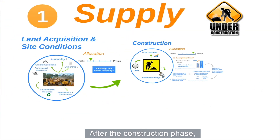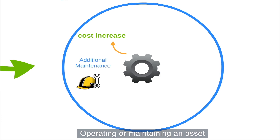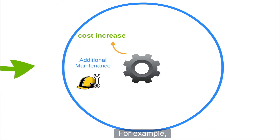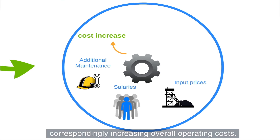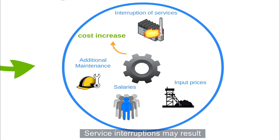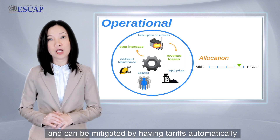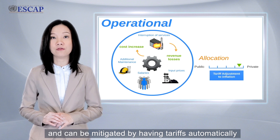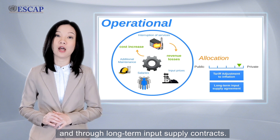After the construction phase, operational risks may need to be considered. Operating or maintaining an asset might be more expensive than planned. For example, salaries or input prices might be higher than anticipated, correspondingly increasing overall operating costs. Service interruptions may result in considerable revenue losses. These risks are also allocated to private partners in a PPP project, and can be mitigated by having charges automatically adjusted to inflation and through long-term input supply contracts.